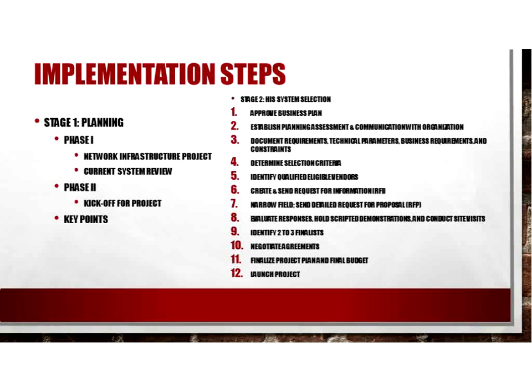All right. And number 10, you're going to negotiate an agreement. Initiate contract negotiations with the top 2 vendors. And you're going to see how that proceeds. You do not want to negotiate with a single vendor. That would be a mistake. You should always have 2 viable vendors emerge from your first 9 steps of the system selection process, and your favorite will emerge from those 2.